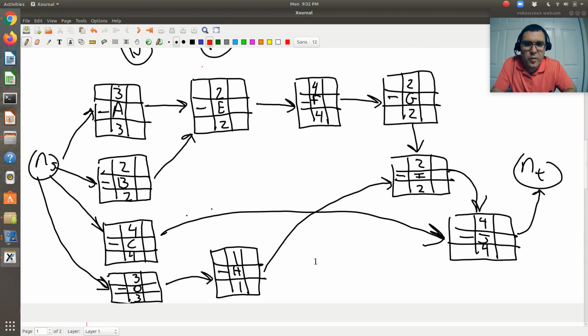We're going to go through and do our forward pass and determine the earliest possible starting and finishing times. And in that process, we will also determine the time to complete our process. When we do our forward pass, I'm going to initialize my starting node at time equals 0. Then I'm going to move forward through my network. So for my starting node, I go to A, B, C, and D.